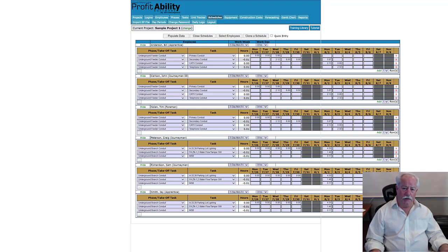And times are good in America now, and particularly in Texas where I'm at. And it seems that there's a shortage of truckers. Freight prices for long haul trucking appear to have gone way up. And that's kind of where the money is for truckers. So guys who do local haul sand from a sand pit to a job site are more scarce, okay? And they've been struggling to get sand. Basically, that combined with the fact that we've been experiencing a lot of rain that shuts our job down for a couple days a week, so these truckers get on a flow hauling sand, then all of a sudden they get 2 days off that they could have been working somewhere else, and then they don't want to come here anymore. Sand has been a real problem.